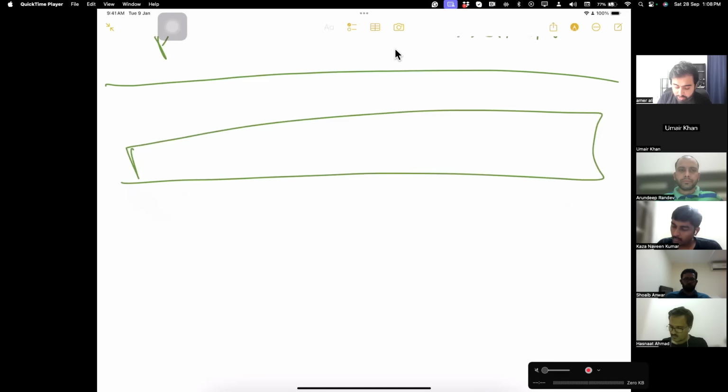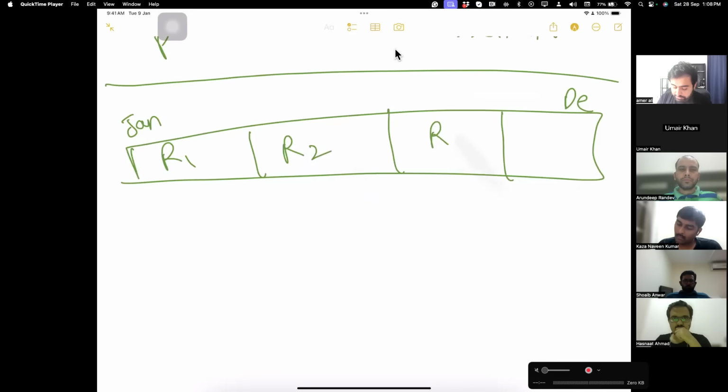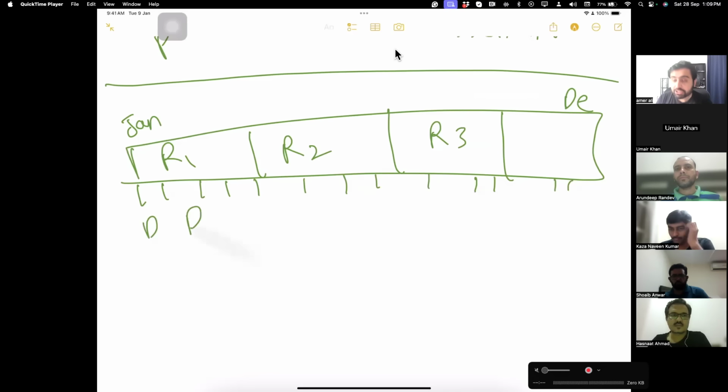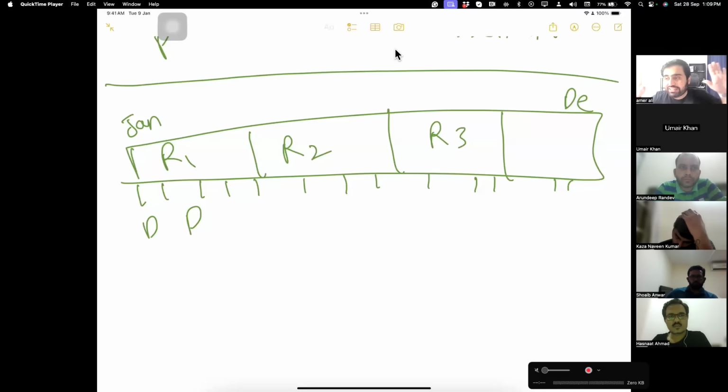So when I talk about rolling wave planning, we plan at a high level. First, we make the entire roadmap, what will happen from January to December, at a high level. Then I plan it in detail. I divide it into releases, say quarterly releases. Then I divide it into sprints. What is a sprint? A sprint or iteration is 1 to 4 weeks, normally 2 weeks. Sprint and iteration are both used names. I divide the project into equal sprints. Then we have daily stand-ups to plan. So as we move forward, we plan in more detail in Agile.